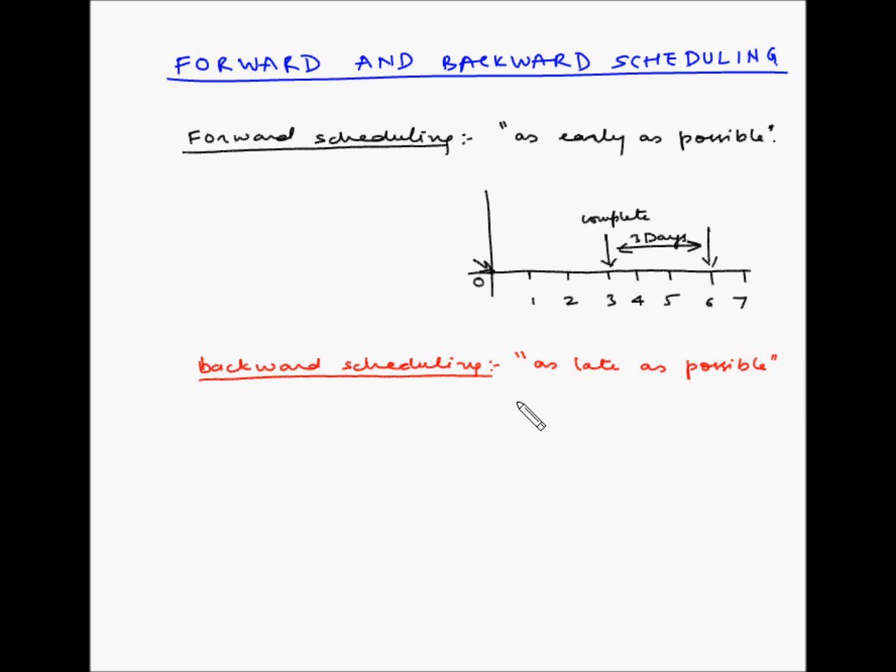So let us consider the same case that we have a job which needs to be delivered on day 6. And it takes 3 days to process this job. So let me again draw a time scale. 1, 2, 3, 4, 5, 6 and 7. So 6th day is the day when we have to deliver the job to the customer. And we are currently on day 0.